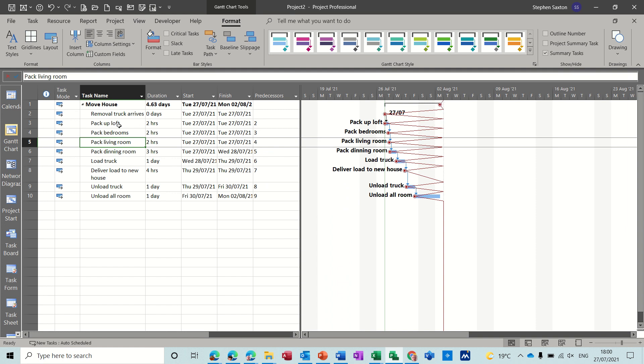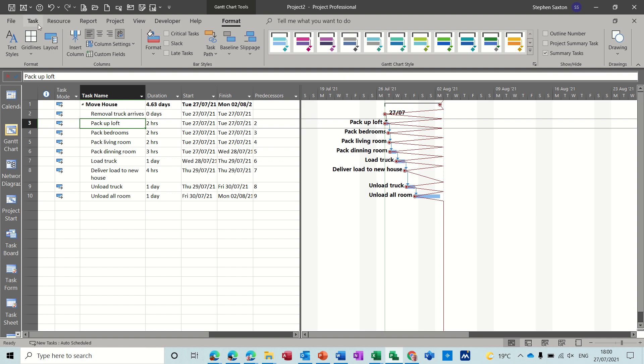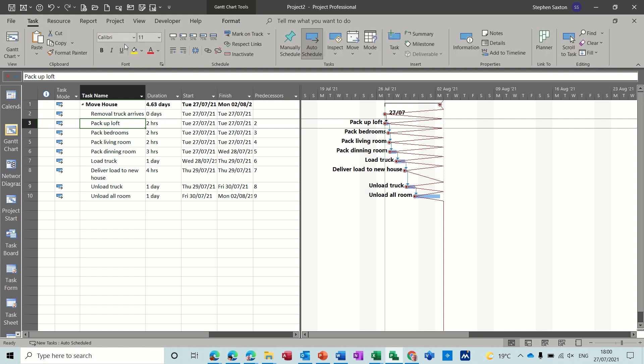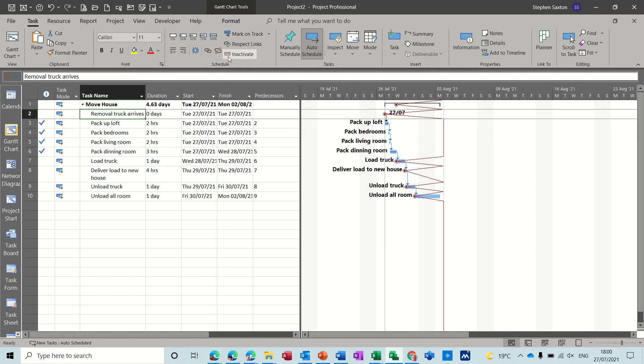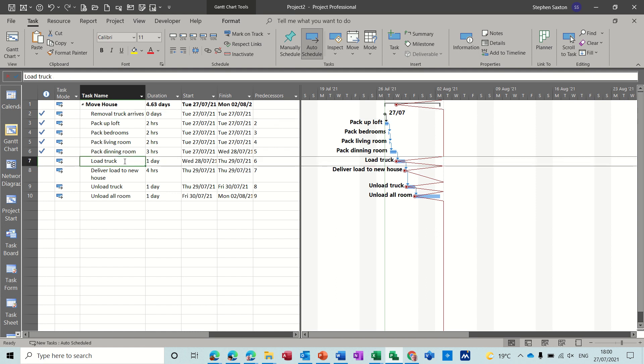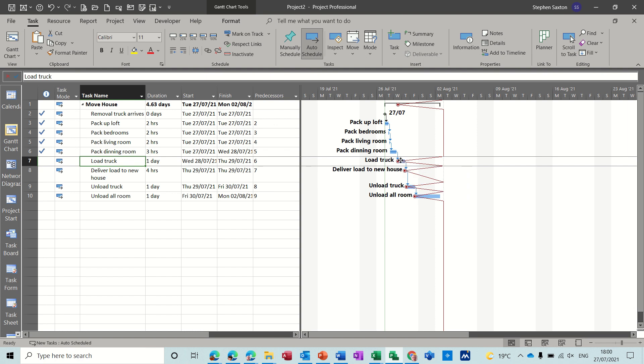However if I start completing some of these tasks, like let's just make that 100% complete, you can see you now get a bit of a straight line there. And if I just highlight a couple of these and make them 100% you can see that there is a straight line appearing down the page like that. Now obviously if you are on schedule as a project you would want that to be a straight line. This is just jumping back and showing you where you've got slippage or where you've got delayed tasks. And if I say for example this is 50% done, so the little marker comes into the task a little bit more.